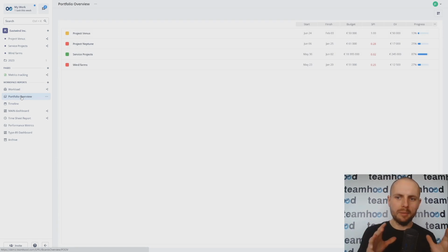Now, I covered a bit of small project and medium project reporting. What if you use a board as a project, which is for medium to large projects? This is the standard way where we see people using big projects. It's very convenient. One project, one board. We have a portfolio overview report, which is really high level. It just tells you, on the board level, what's the start and finish, what's the total budget, what's the progress of all the tasks inside the project.